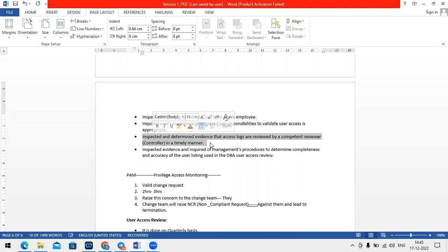If the change manager feels otherwise, for example somebody says I'm just trying to restart my server, so it is a low risk change, I question them: you are restarting a particular server, right? There would be some downtime of seconds. Whether there would be a fallback or failover, all these things we need to consider. So overall, from an auditor point of view, we need to check.